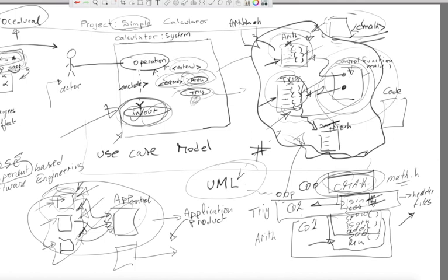One of the challenges for us as software engineers is, what do we start with? How do you give value to CO1 or CO2 or CO3 in terms of which one you should tackle first? That's where you may have to look at each one of these as what we call a story, and then assign some sort of a value, sometimes called value points. They could be priority,